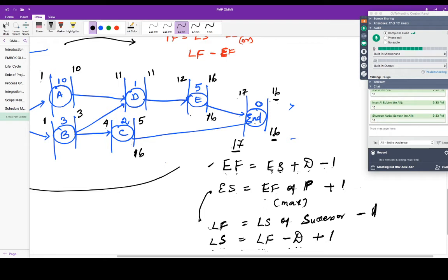Why am I using this end milestone? To ensure that nothing will go wrong, so you will not make a careless mistake. If you're very comfortable, you need not even do this step. If you have three or four last activities with an open network, it is not closed, it's kind of an open network.